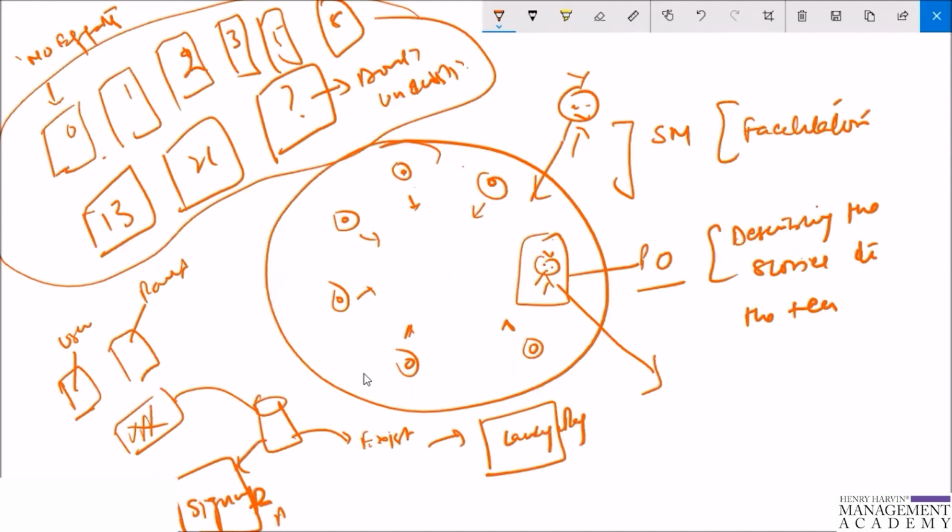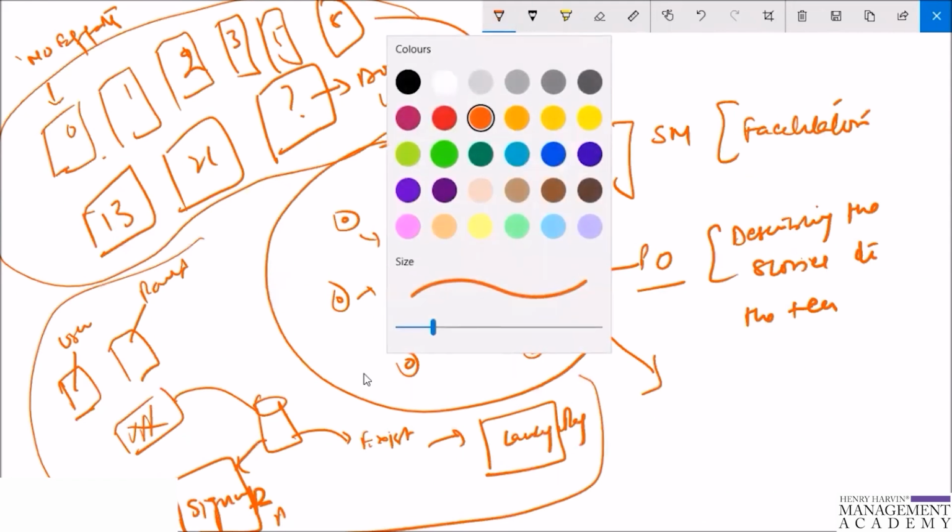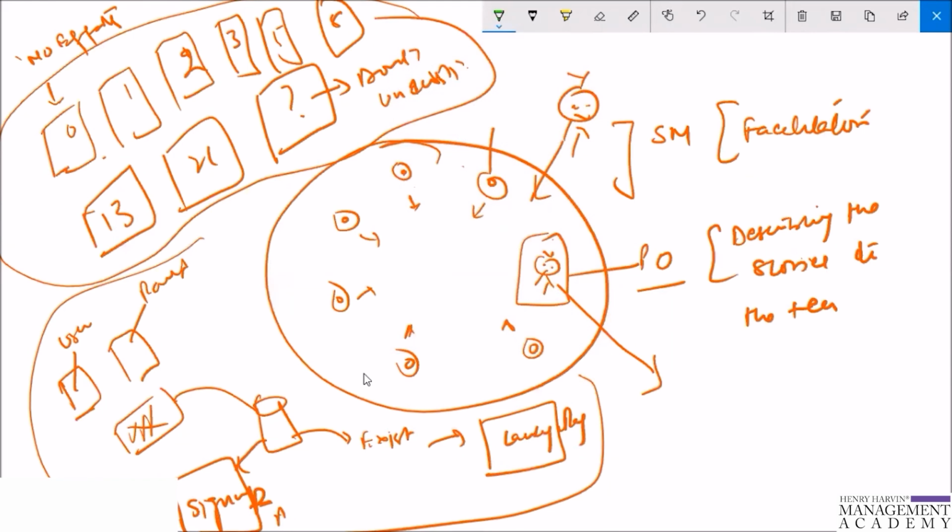Now suppose all these persons involved, front end and back end, want to estimate this story. Suppose this guy comes up with a story point. Suppose he says that this story is going to be 13 story points, right? And one individual here says that this is going to be 8 story points. This individual says that it is going to be 5 story points. This one agrees 13, this agrees 13, and this agrees 13. So now there is a conflict: 1, 2, 3, 4, and 5 people are saying 13 story points. One is saying 8 and another is saying 5.